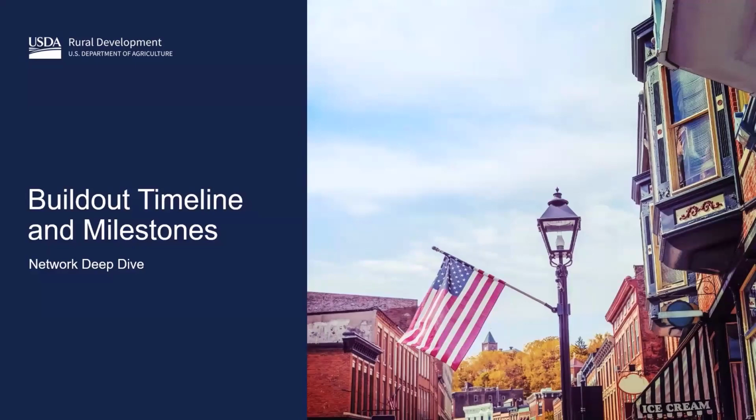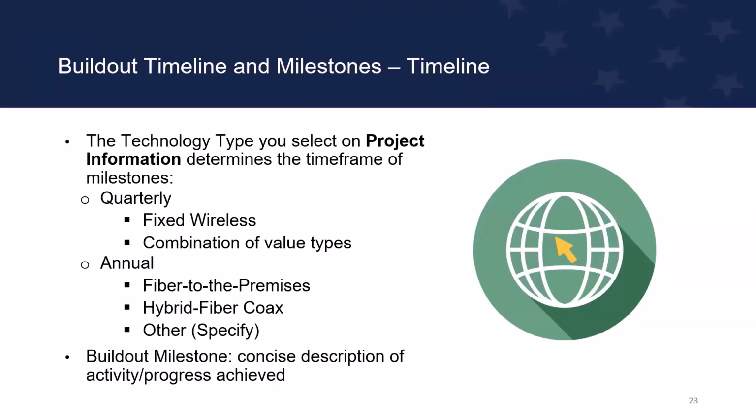Build out timeline and milestones. So technology type is going to determine the time frame of your milestones. With fixed wireless or a combination of fiber and fixed wireless, we would want to see those milestones presented in a quarterly time frame.